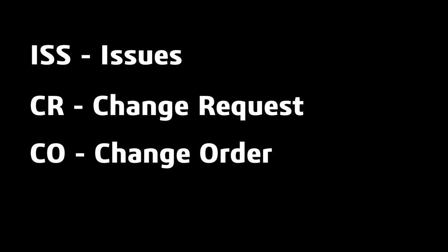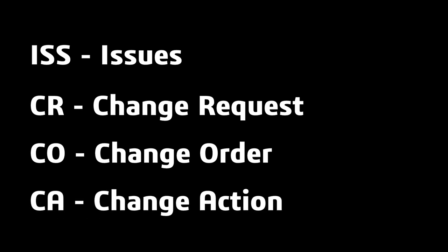Once a change request has been evaluated, it can be sent to a change order which is governed by a change manager or coordinator. He is in charge to make sure that all changes in the company are enacted. If you're using change orders, there's a number of changes that can come out of that order which will result in multiple change actions on your CAD models or documentation. If you're not using any of this process, you can skip issues, change requests, and change orders and go directly to change actions, allowing you to document the changes that are proposed for your CAD models and turn those into realized changes that are then released for everyone else to use.